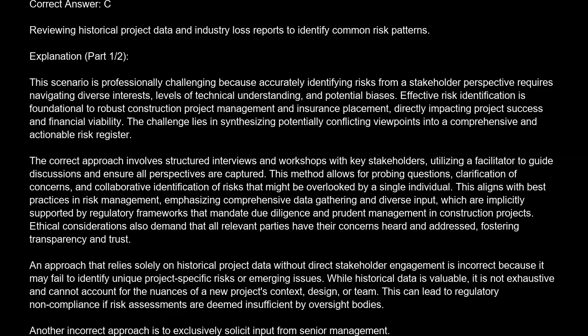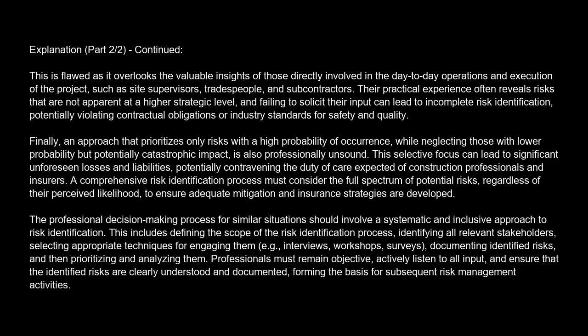Another incorrect approach is to exclusively solicit input from senior management. This is flawed as it overlooks the valuable insights of those directly involved in the day-to-day operations and execution of the project, such as site supervisors, tradespeople, and subcontractors. Their practical experience often reveals risks that are not apparent at a higher strategic level, and failing to solicit their input can lead to incomplete risk identification, potentially violating contractual obligations or industry standards for safety and quality.